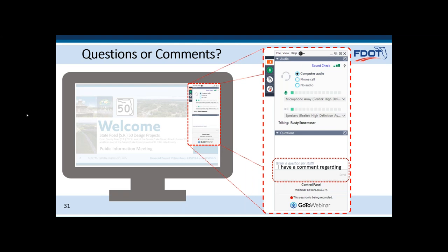Is a public water line planned along the route? We are currently coordinating with utilities. The utility relocations are currently not part of the roadway project. They will likely be occurring along with it. Utility companies are right now assessing what relocations are necessary, and we'll be adding that information to the plans as we progress. That will be up to the utility companies to determine, though.